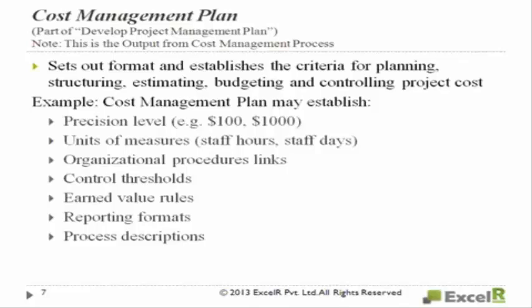Okay, and you will have the organization procedure links. If you can recall, I told you in the WBS, at one level you will link to the accounts. Can anyone tell what that level is called? I told you in the WBS, one level above work packages, perfect. It's control accounts. So the control accounts level is where you will control, you will manage, you will report.